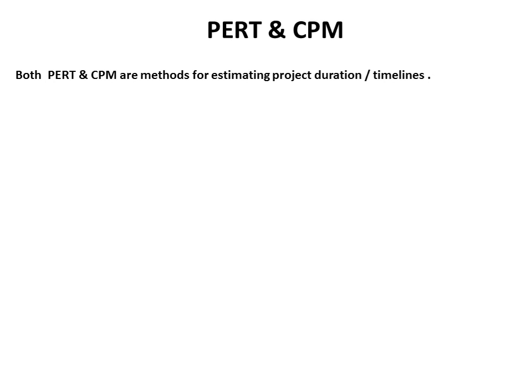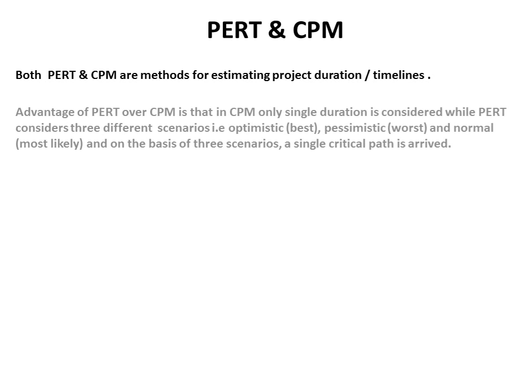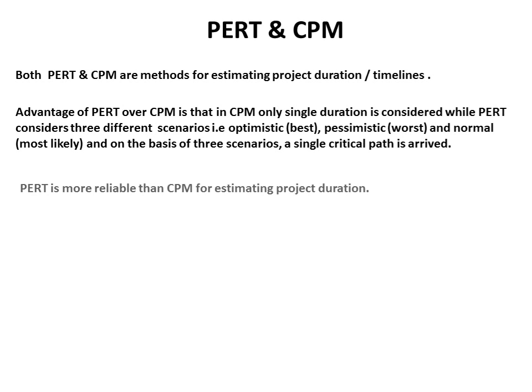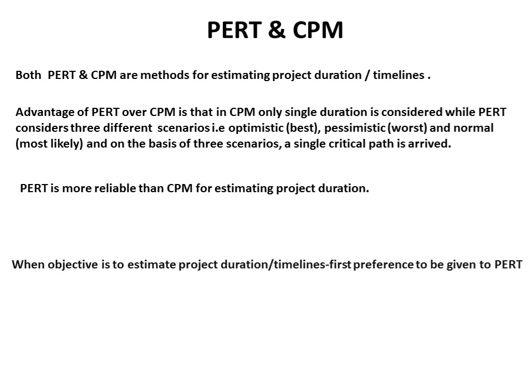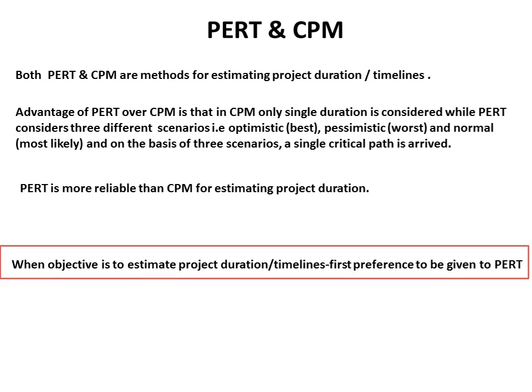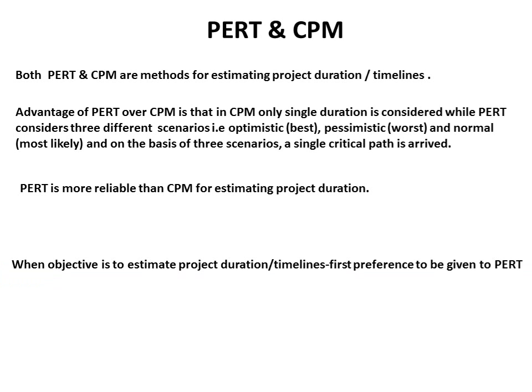PERT and CPM are methods for estimating project duration or timelines. The advantage of PERT over CPM is that CPM considers only a single duration, while PERT considers three different scenarios: optimistic, pessimistic, and most likely (normal). Based on these three scenarios, a single critical path is derived. Therefore, PERT is more reliable than CPM for estimating project duration, and should be the first preference.